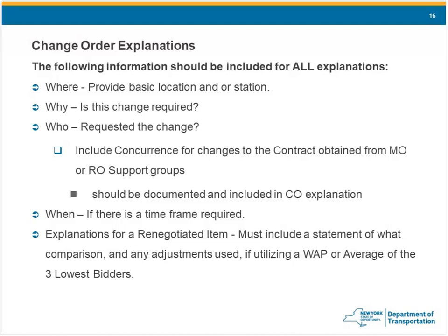What Eric meant by that was if your quantities are increasing by more than what is assumed to be due to more accurate field measurements, which that general rule of thumb is about a 10% increase, then you can usually say it's due to more accurate field measurements than the design engineer's estimate. But you can't say more accurate field measurements if there was a blow in the quantity more than 10, maybe even 15%. So the bigger dollar value increases are usually because an entire situation was missed or a gross miscalculation, something like that.